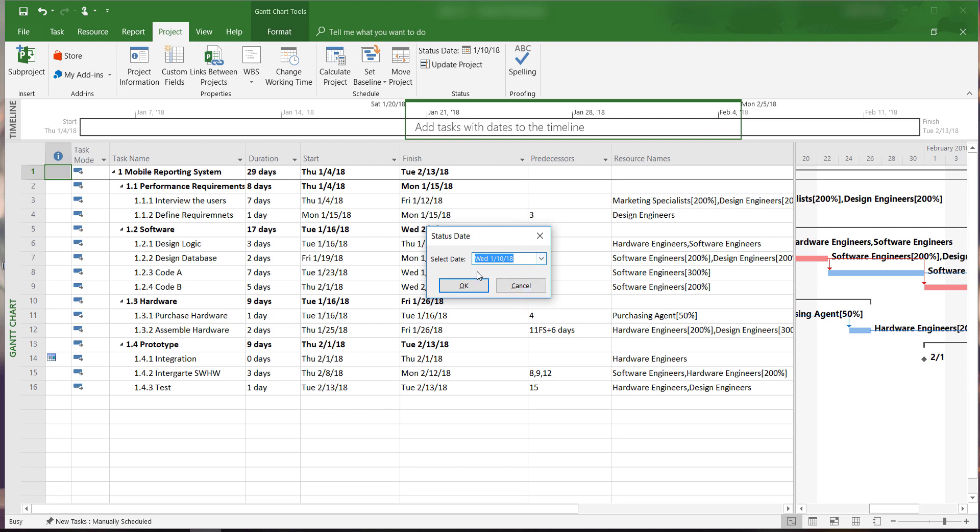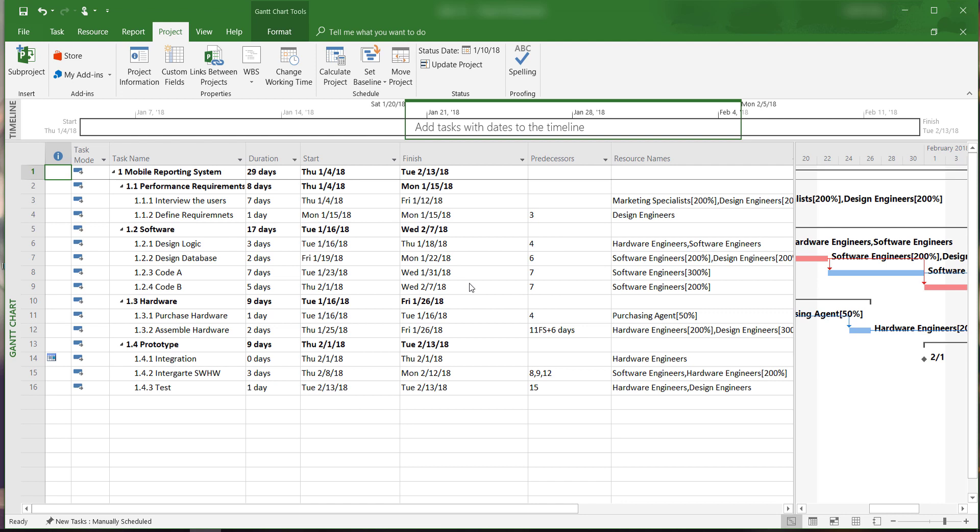Remember to always update the status date before we generate the status report to get the accurate result, because the software will compare actual progress against the planned progress in the baseline up to this date.